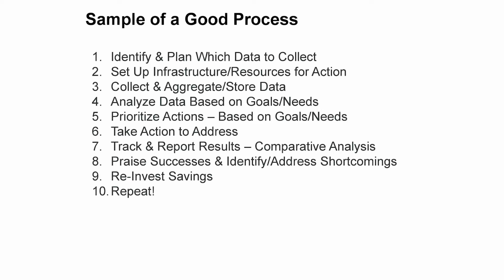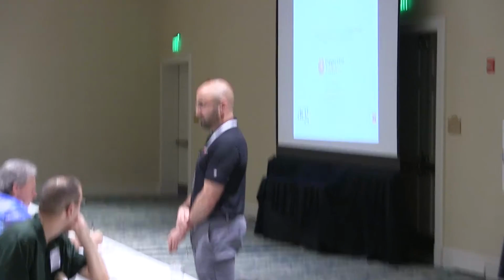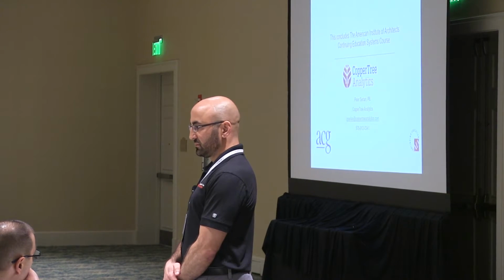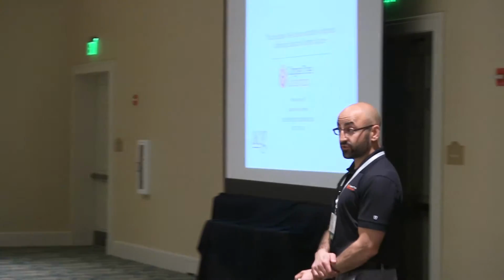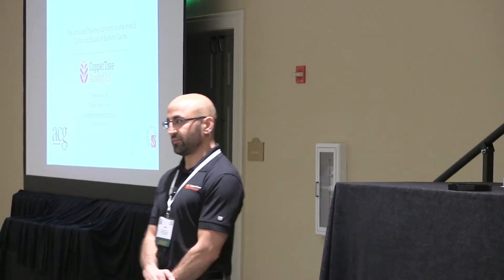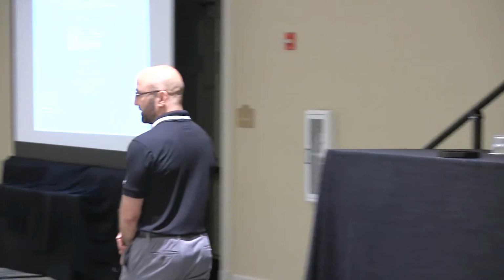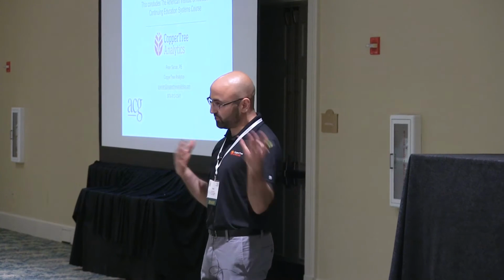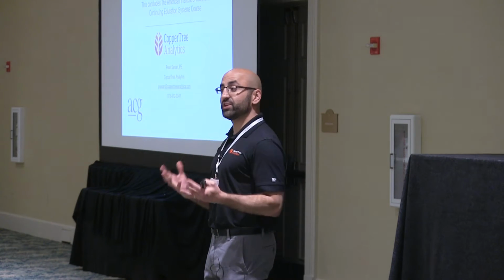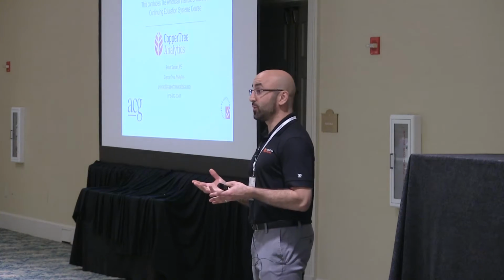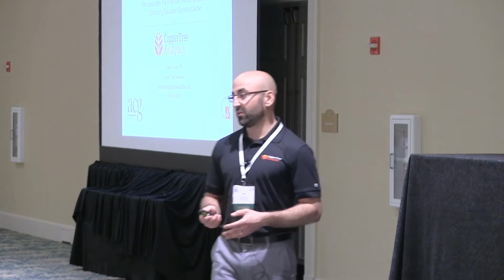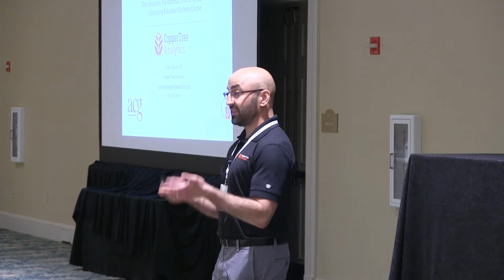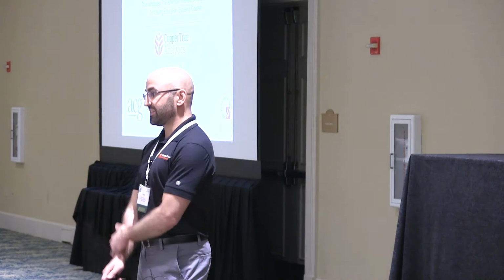If the owner of the new building construction is a user, then you have to make a decision to use this product in the design. Does the decision have to be made to be able to use the product? So for new construction, the key is really getting put into the spec, the design spec for that building. So it's educating design engineering firms and showing them what a tool like this is, and then encouraging them to include it in, even if it's an optional scope item, right? But including it in the spec, so it gets deployed as part of the new construction process, because it's actually in the RFP or the design spec.